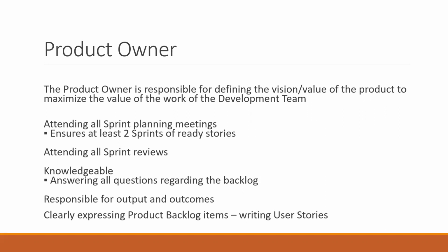So the product owner, I think she typically does this thing. She submits these features, these videos, to the stakeholder ahead of time for a short review, before she starts doing the proper productization and writing out user stories related to features and all of that. So subject to their approval or review, that's when she would then proceed to start developing the user story, prioritizing it, and putting it in appropriate ways so teams would clearly understand them.